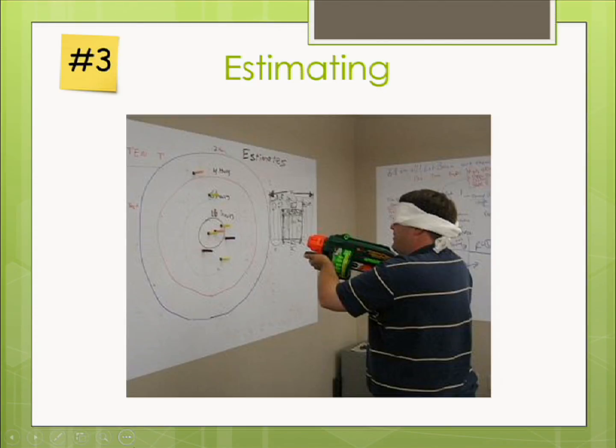The people doing the work ideally should be the people doing the estimates, and estimate your testing and your analysis as well. A lot of people don't estimate analysis, but then BAs just get sucked into this world where they get churned up because there's no estimate of how long this stuff's going to take. So I want to know up front, if an analysis is going to take a long time, I want to put some other people on it to help.